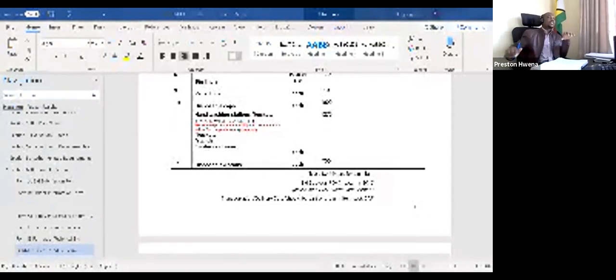We use these documents to get our duty-free certificate. Only after we have obtained the duty-free certificate will we allow you to ship. Once the cargo arrives at the port of entry, which for us, if it's coming by road from South Africa, is Beitbridge, Harare International Airport, or Forbes border post, we take over the clearing.